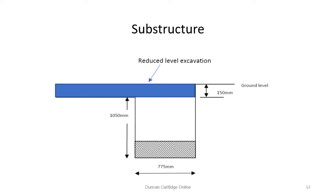All excavation, of course, produces varying amounts of excavated material. Some of this can be reused in making up levels into landscape areas, but much of it has to be removed from site as it is unsuitable. Any contaminated excavated material must be kept separate and disposed of carefully in an appropriate tip.